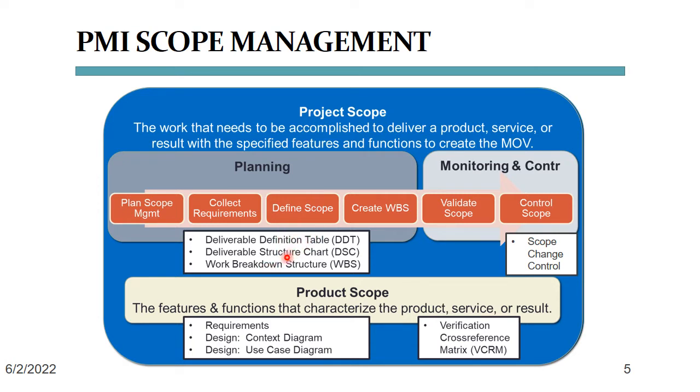Of course, when we are implementing all our technical steps 2 or 3 months down the road, we have to always check that we have followed all the instructions and requirements. That is called validate scope and happens in the monitoring and controlling phase along with the control scope task. Remember the importance of change requests that come in so handy when you're asked to change what and how much the project is working on. That's where the change requests are being collected and analyzed, and sometimes the project sponsor will approve them, and sometimes not. All of these tasks are the management tasks for the project.